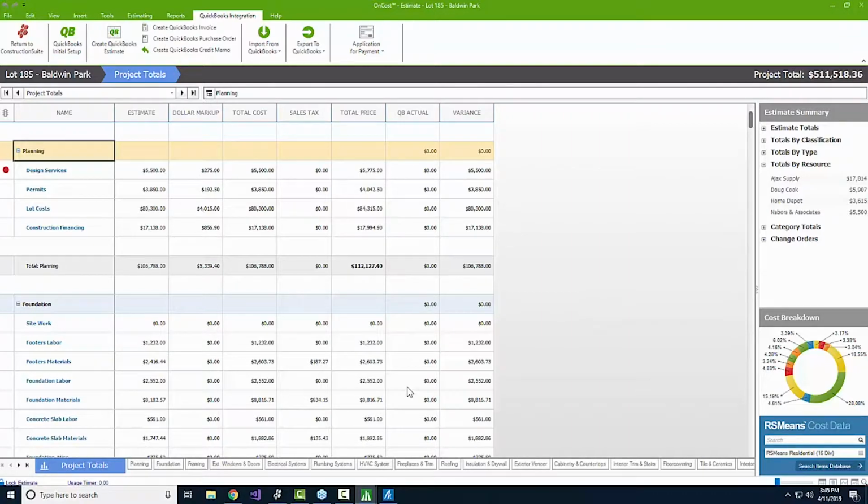It's showing us as often as we want. I'm going to say every week it's going to show you where you stand on this job so you can make smart decisions a few weeks in. Not a few months after. So I think that's the biggest takeaway there: we want to make sure that we have that information and that we're using it to make decisions in real time or much closer to real time than 3 months, 6 months post job.